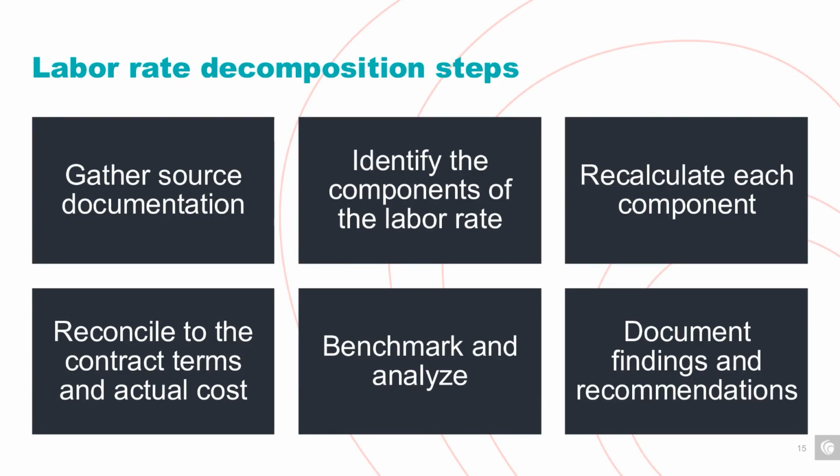So they should be able to provide you a rate determination letter demonstrating their current premium. For things like workers' compensation insurance, if this can't be provided, you can typically find the rates posted on your state's applicable workers' compensation website. And this can be used as a reasonable test for your contract, as your contractor's actual rate would be adjusted by their experience modifier that takes into account how many claims they've had in previous years.